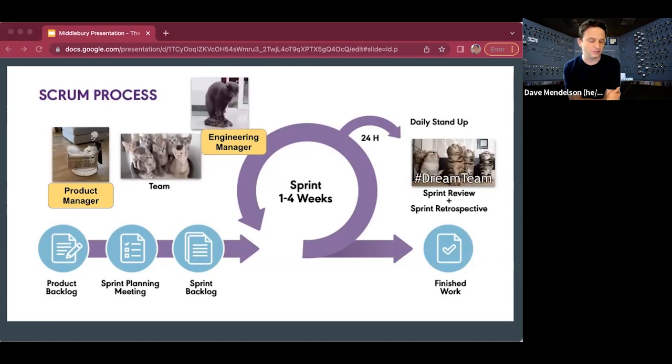The other thing is not taking into account the day-to-day reality of work, meaning folks have meetings, bugs happen, customer escalations happen, and you need to allocate time to deal with that. If you're taking a very idealistic view of how much people could actually work in a given day or a week, that's also often a problem.